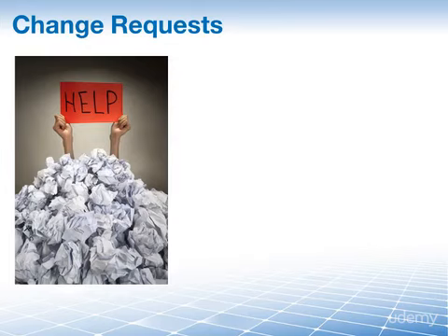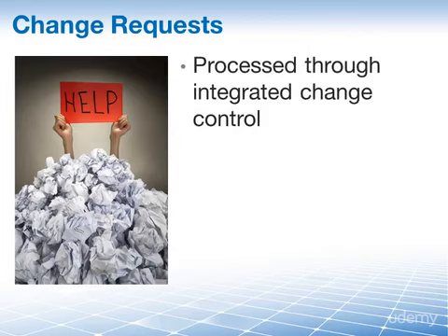Whenever you administer and inspect, you will inevitably have changes popping up. Sometimes this causes problems. As in any other process, changes are always implemented through your project's integrated change control system. There are no exceptions to this.